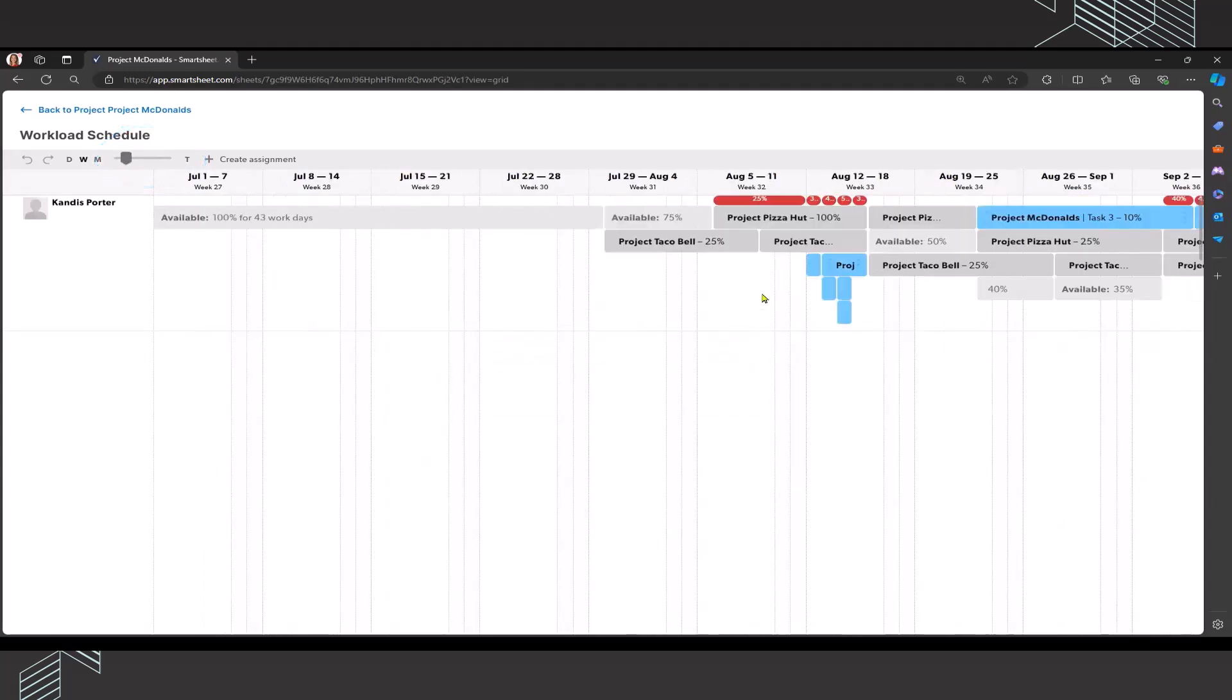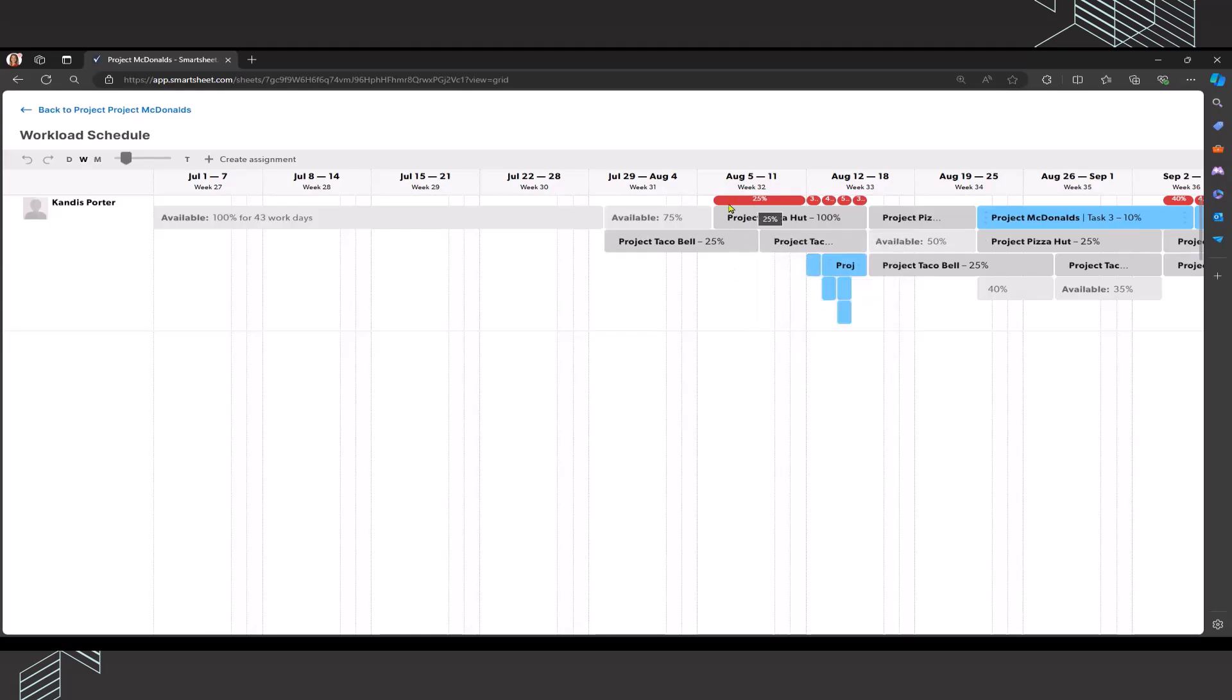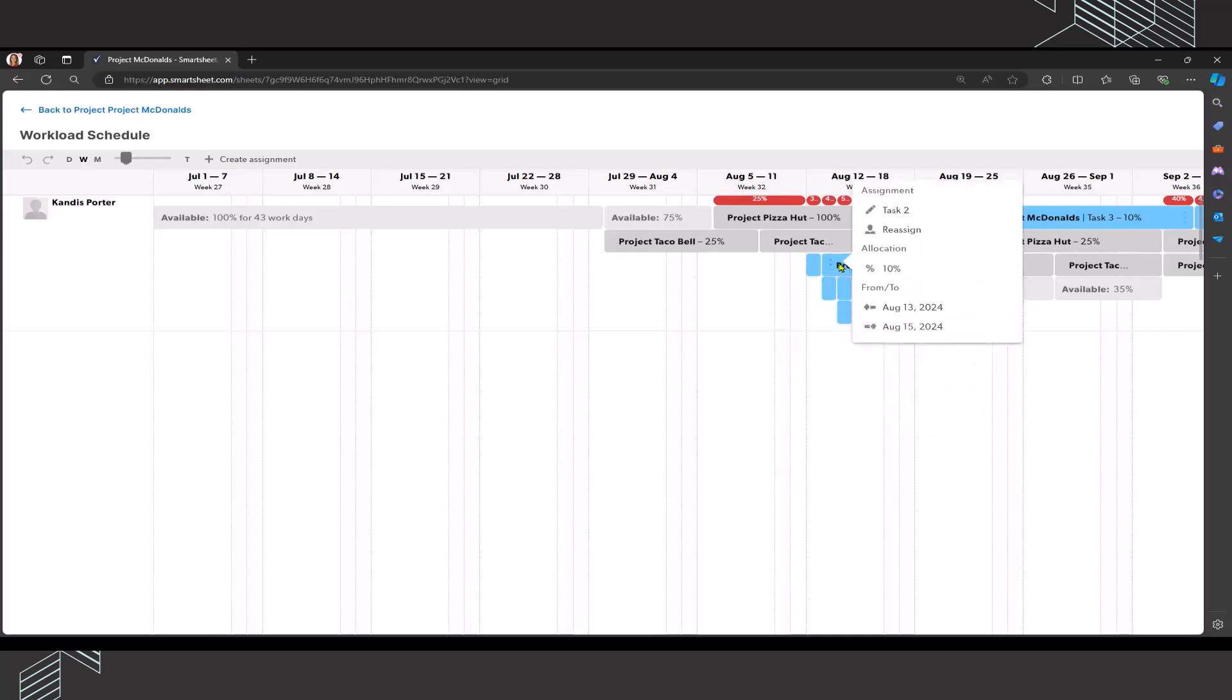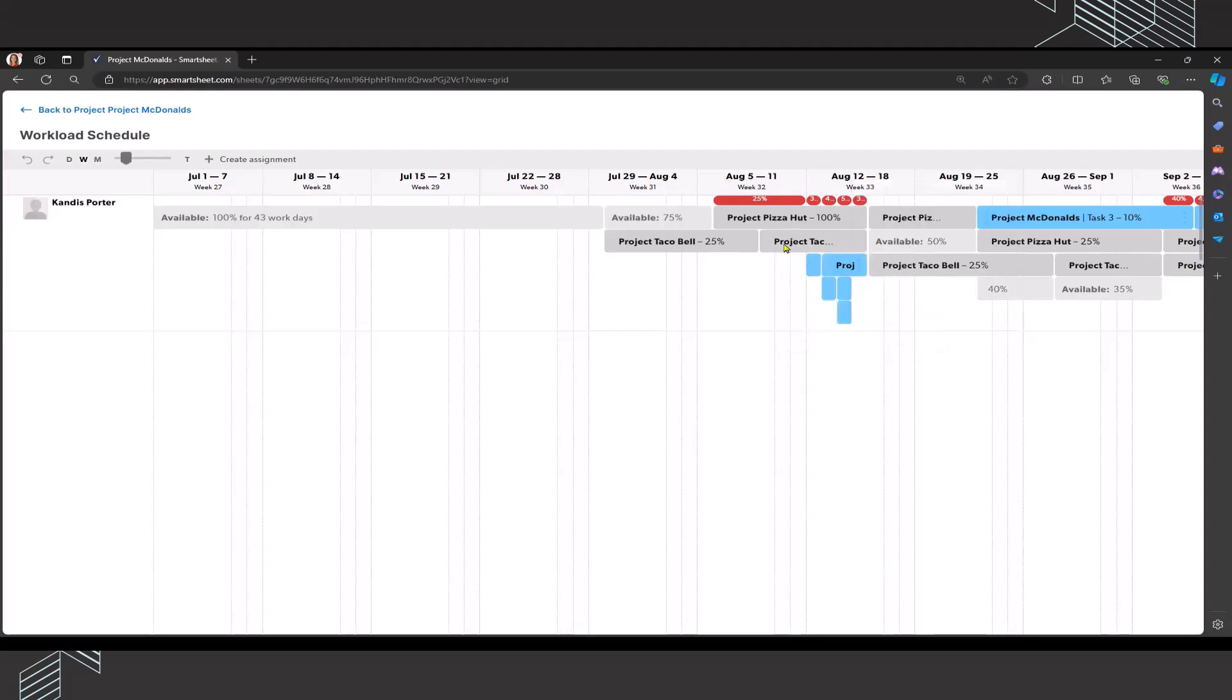I am going to zone in on the week of August 5th through 11th because that is the first period that I see that I'm over allocated. I went through the color coding of what the different colors mean on the workload schedule. The assignments that are showing up in blue relate to this particular project. That's really an important aspect because these are the ones that I'm going to be able to click into and I'm going to be able to look at the task and I can actually reassign it if I'd like. The ones that are showing up in gray won't let me double click on it.